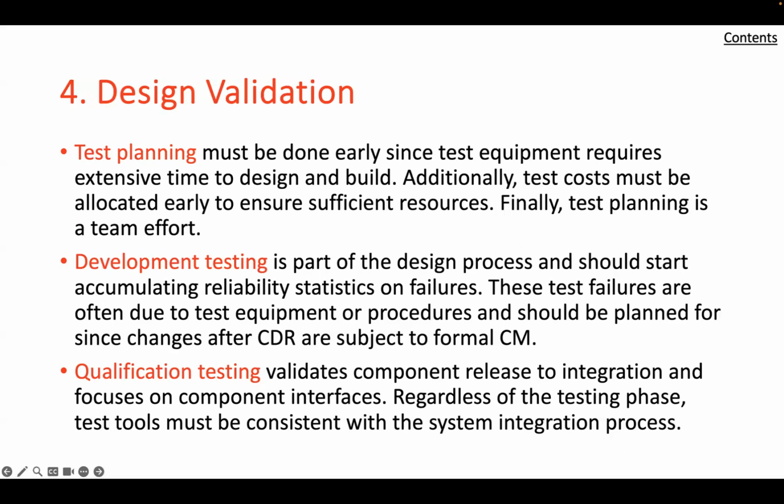That is, what should be tested, at what stage in the development, to what degree of accuracy, what data should be obtained, and so on. An important system engineering contribution is to ensure that component features that were identified as potential risks are subjected to tests to confirm their elimination or mitigation.